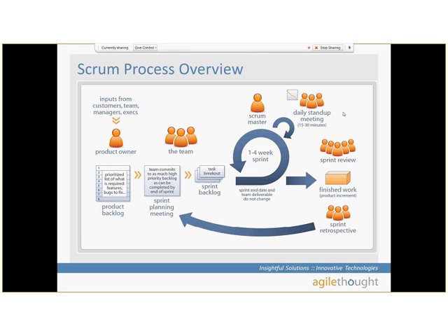Is the Scrum process. The really important stuff for us right here is how long your sprint is going to take. I generally recommend 1 to 2 weeks. I don't like them to be longer than that if we can avoid it. And again, the product owner is looking at this list of user stories usually. It might be bugs in there as well, and that's their product backlog.